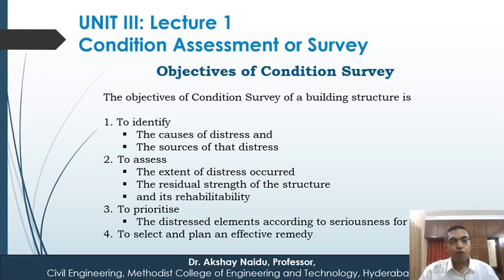However, where from the moisture is leaking? It is not enough to know the cause of the distress, but it's also to know where is the source of that cause that is starting. So that unless we identify these two together, we will not be able to provide an effective solution. We may give a solution without identifying the actual cause.